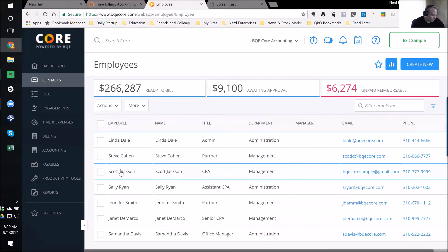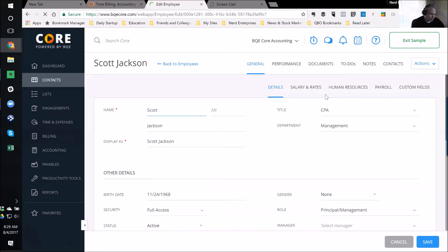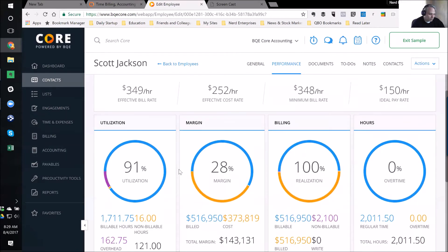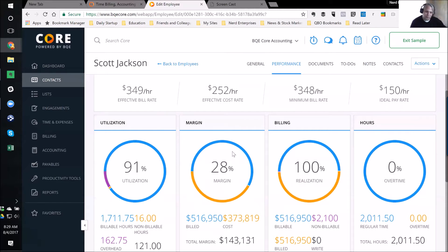Let's pick on Scott Jackson, since that's who we're pretending to be today. Let's go to his Performance. Now we can quickly look at an employee's performance. Utilization: 91%, meaning 91% of his time is billable time — time spent directly on a project earning us money. That's generally considered pretty good. I love how quickly I can get that information about an employee.